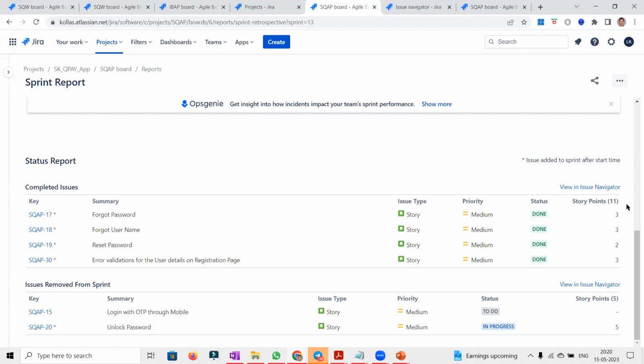In such cases, yes, let's close the current story with the changes or whatever scope we completed, and create a separate user story with different estimates. It might be done in the same sprint or maybe in a different sprint. Let the product owner define the priority, the scope and the timelines. Let the team take it up. And make sure this is all documented in the current user story: what scope change happened, and the logic or reason for creating a separate user story for this new scope.